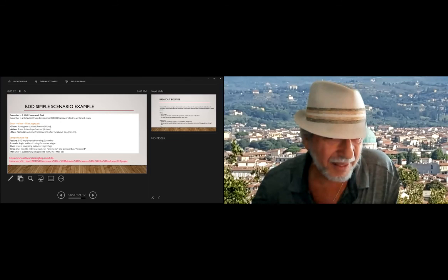So I'm looking at this and I'm thinking, I'm not going to do sprint planning or any kind of planning, depending where I am, unless I've completed this piece of work, because I'm not going to assign a user story to a developer to do within a 2-week sprint if I haven't defined this. That's the question.